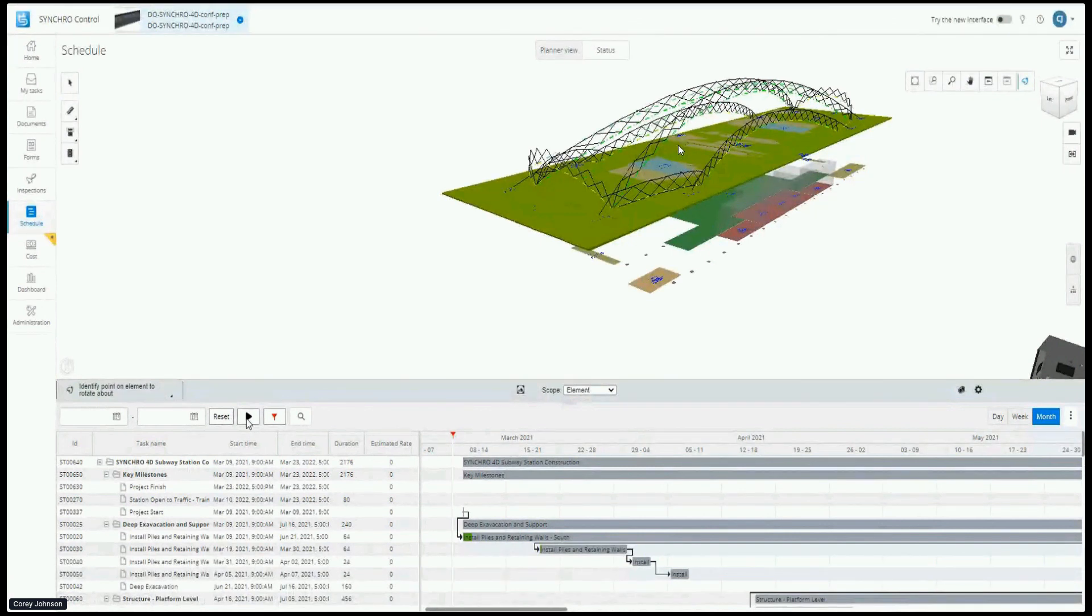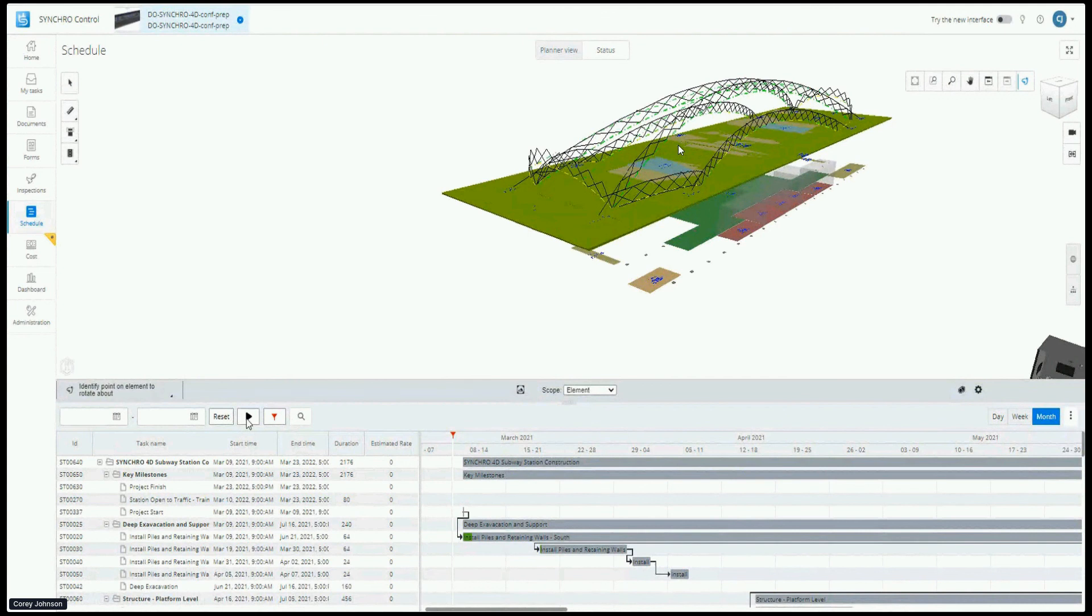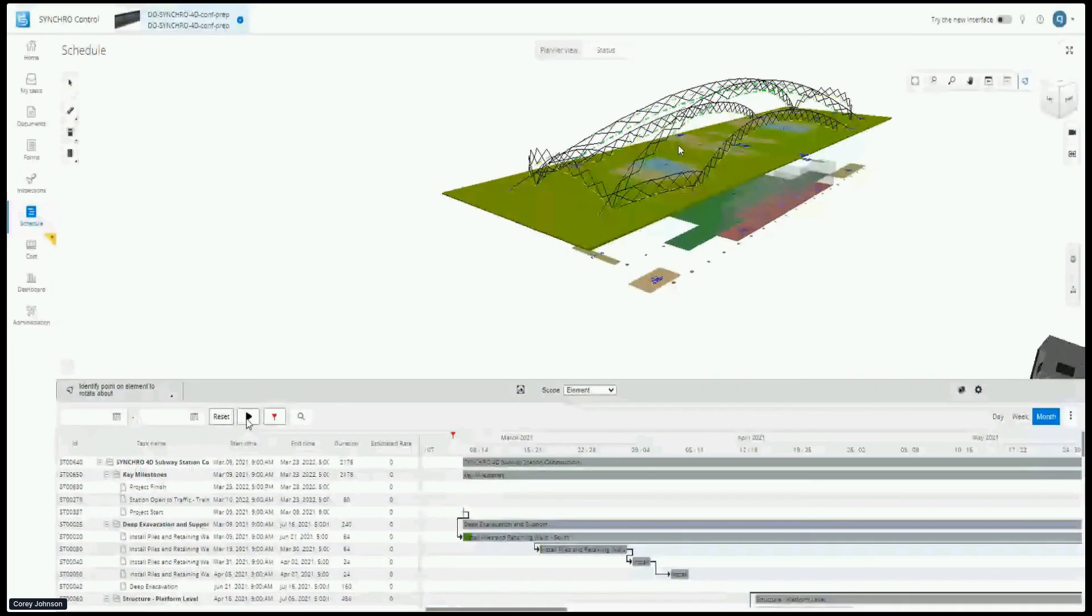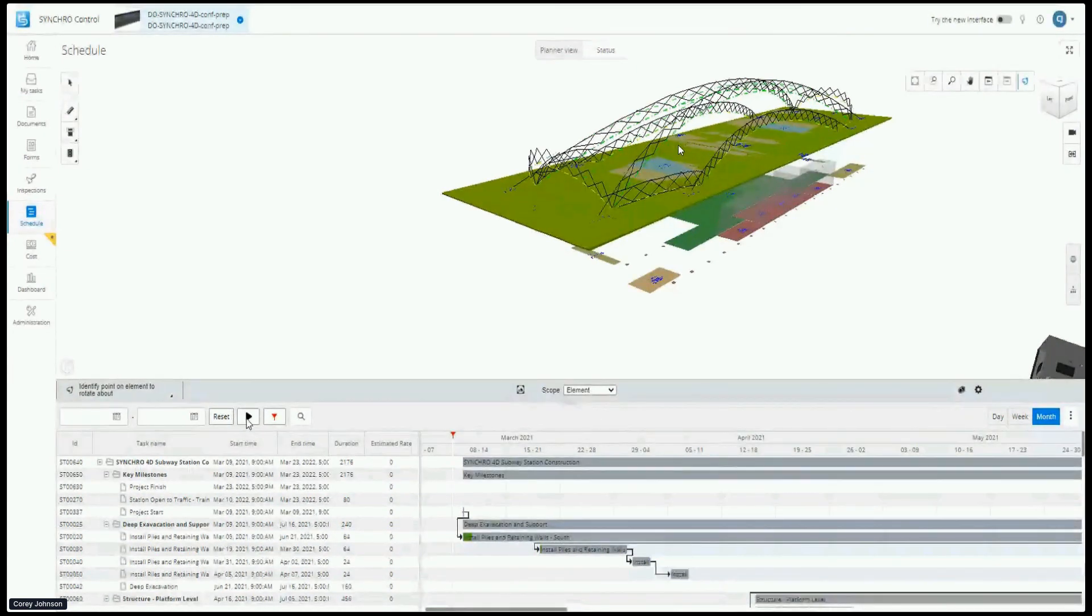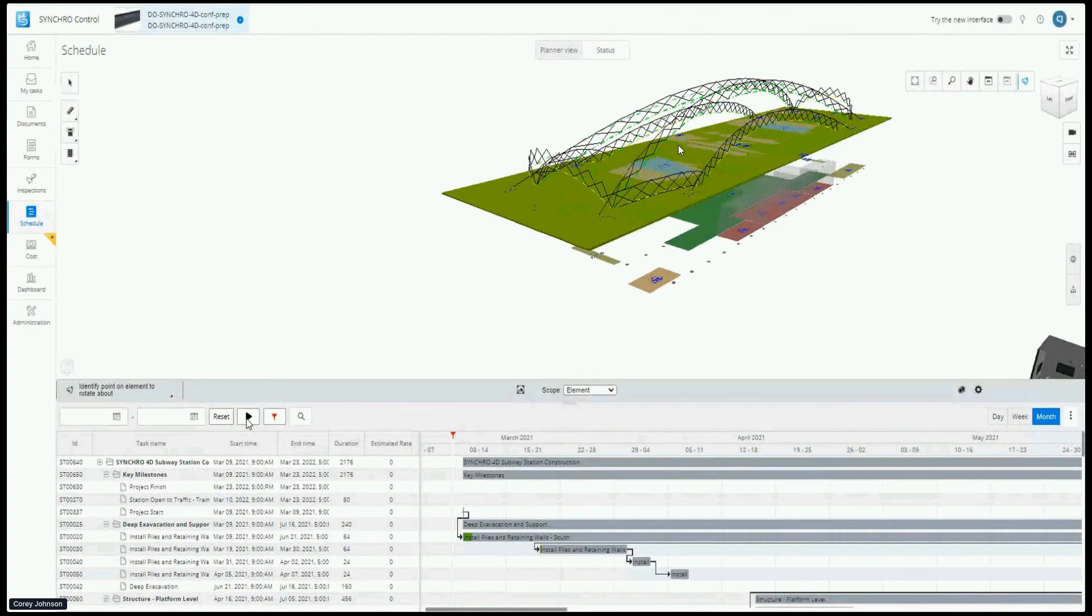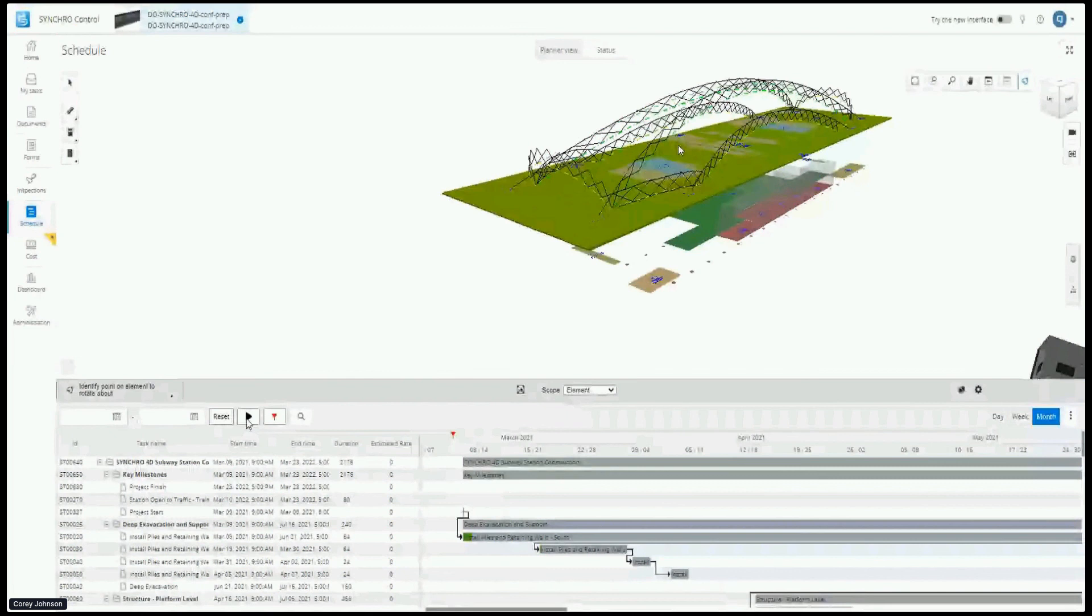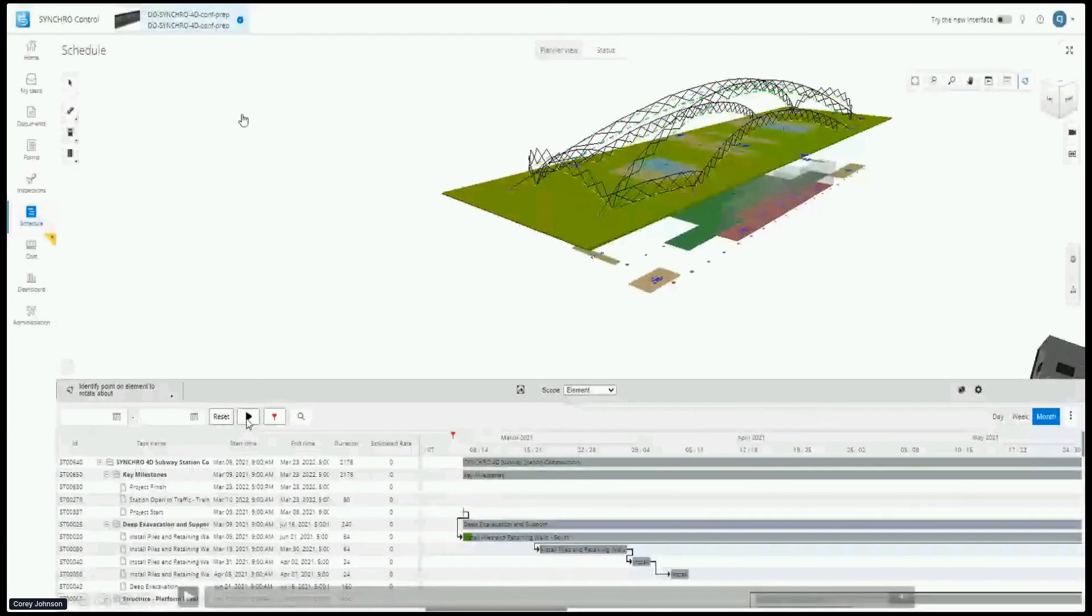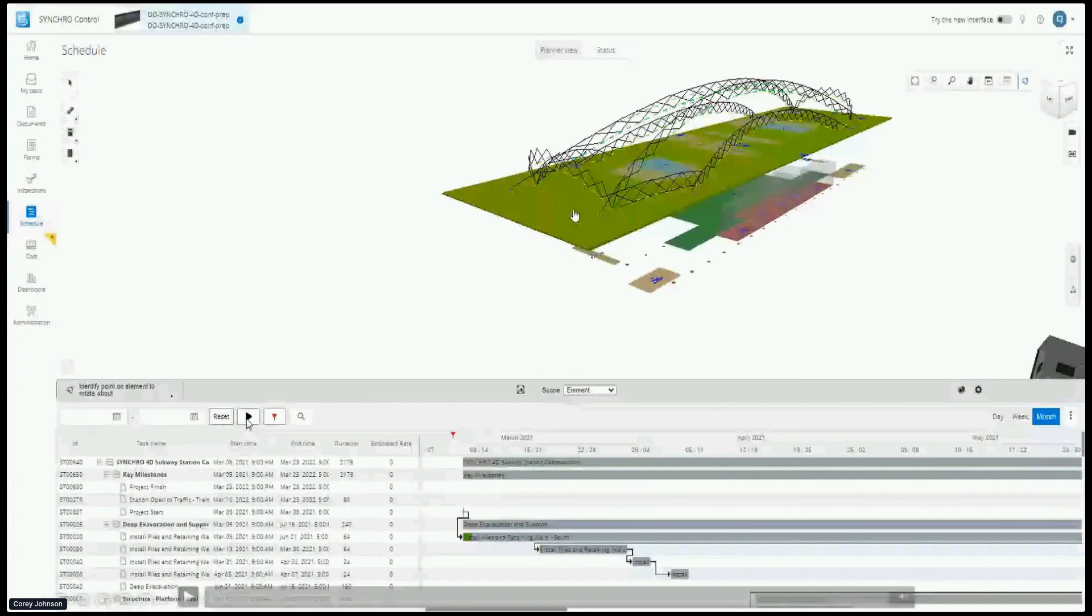All right, trying to keep us on time, Jerry. Are we done? Do we have time to go a little bit longer? Can we use it for earthwork? We can use it for earthwork if the earthwork is modeled in 3D. If there's like a 3D volume of the shape - I happen to know that OpenRoads and Civil 3D, they have those capabilities - so if there is a three-dimensional mesh shape, we can actually start to track against that, yes.